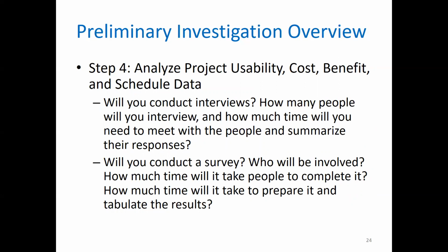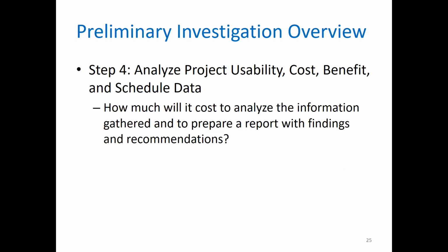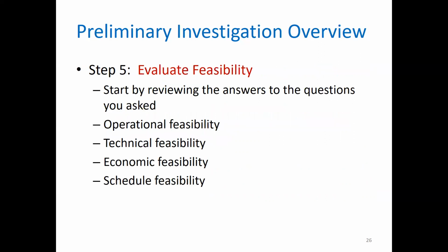Will you conduct interviews? How many people will you interview? How much time will you need to meet the people and summarize their responses? Will you conduct a survey? Who will be involved? How much time will it take people to complete it? How much time will it take to prepare it and tabulate the results? How much will it cost to analyze the information gathered and to prepare a report with findings and recommendations? So this is how you will go around analyzing project usability, the cost, the benefit, and the schedule data.